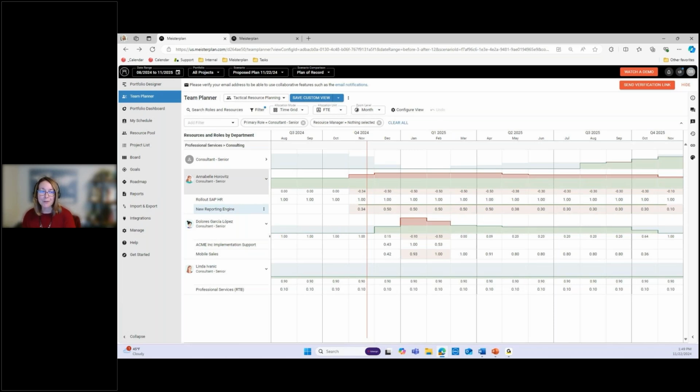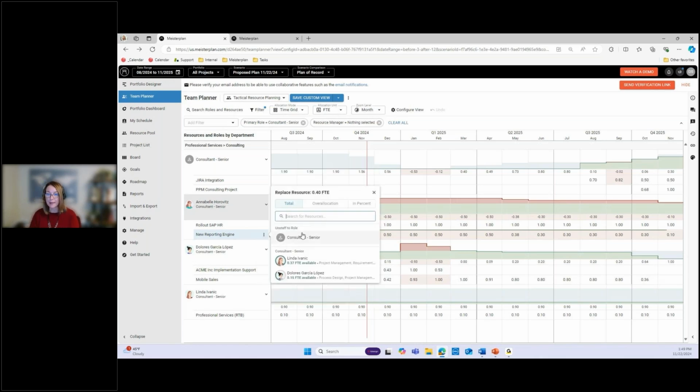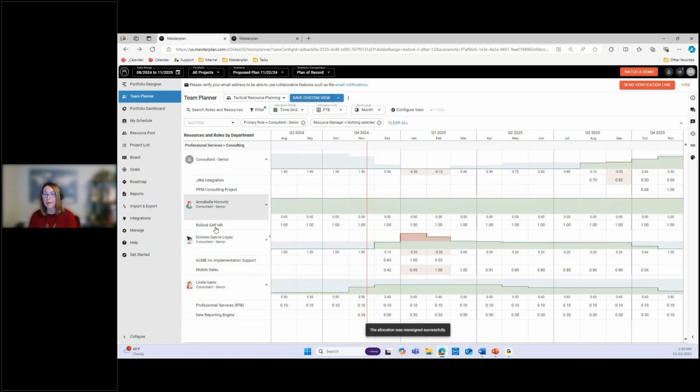All right. Some other things that can be helpful while you're in here is, besides looking at the projects, seeing who you need to staff them to, leveling out the projects. While you're thinking of leveling out projects, there might be something you need to do on changing who is assigned that project. So if Annabelle here cannot work on new reporting engine, I can replace that resource and give that to Linda. By default, everything comes up to who's available, and I can move that down to Linda's availability.